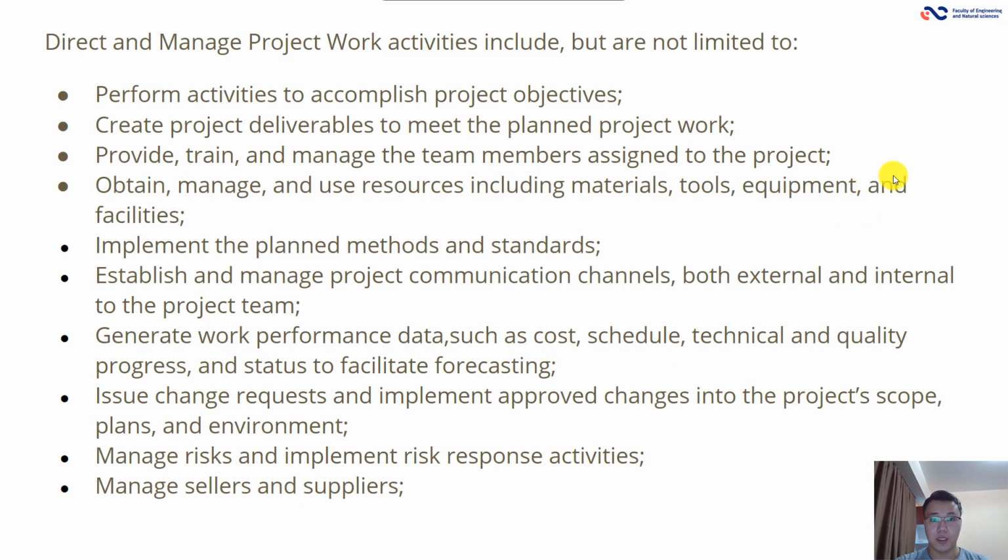Direct and manage project work activities include, but are not limited to: perform activities to accomplish the project objectives, create the project deliverables to meet the planned project work, provide, train and manage the team members assigned to the project, obtain, manage, and use the resources including materials, tools, equipment, and facilities, implement the planned methods and standards, establish and manage project communication channels, generate work performance data such as cost, schedule, technical and quality progress, issue change requests and implement approved changes into the project scope, plans, and the environment,